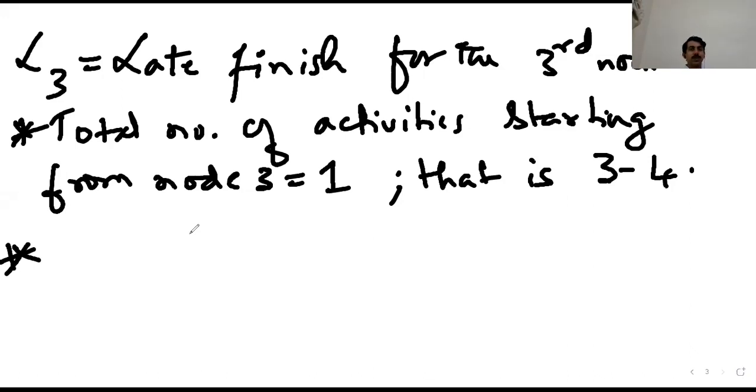That would be a proper format, so that we can keep a count of the order and know which nodes' calculations are completed. So it is better to calculate in decreasing order, instead of doing it randomly.